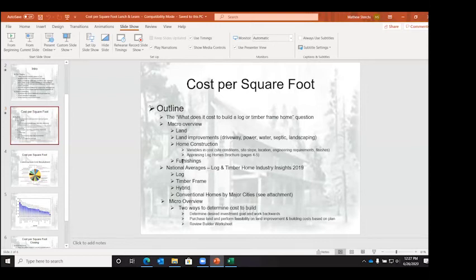One is what we call determining desired investment goal and working backwards into it. So let's say I want to build a project and my investment goal is $500,000, and I'm just picking random numbers. Based on that $500,000 building budget, I want to know what budgets I should specify for each line item. Meaning, how much should I dedicate to foundation? How much should I dedicate towards cabinetry and kitchens and countertops?